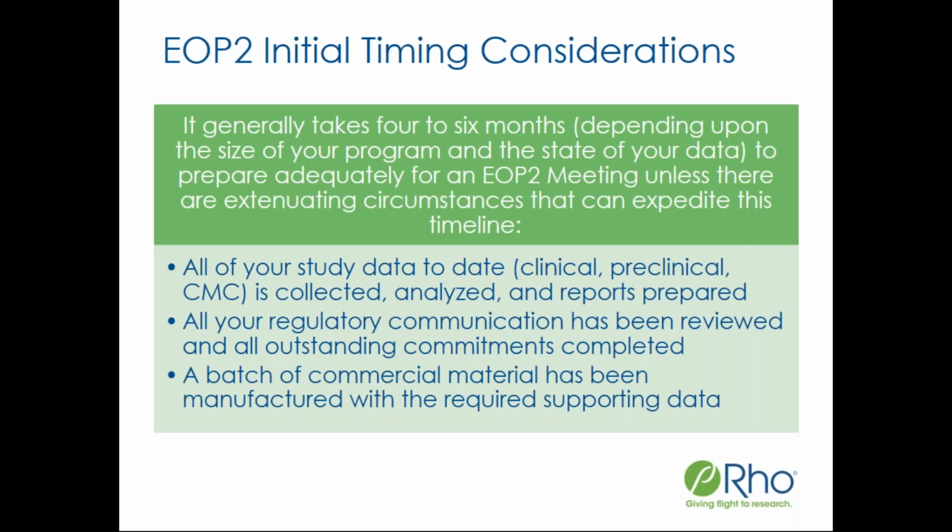Overall, assuming you have been moving your development program forward appropriately, it's still going to take on the order of 4 to 6 months to truly prepare appropriately for an end of phase 2 meeting. And that encompasses analyzing your data across the board, preclinical, clinical, CMC, and so on, reviewing all of your regulatory communications and correspondence to make sure that you are appropriately addressing any commitments and guidance and recommendations from FDA.